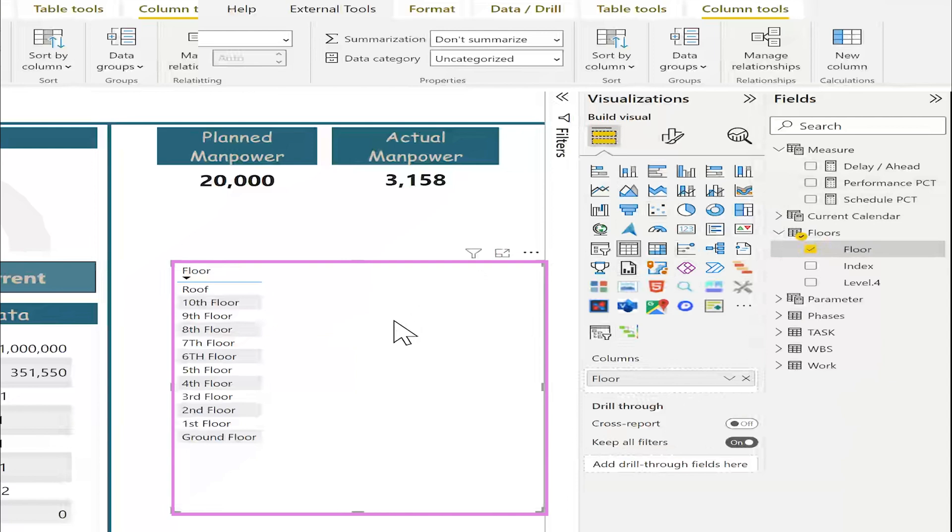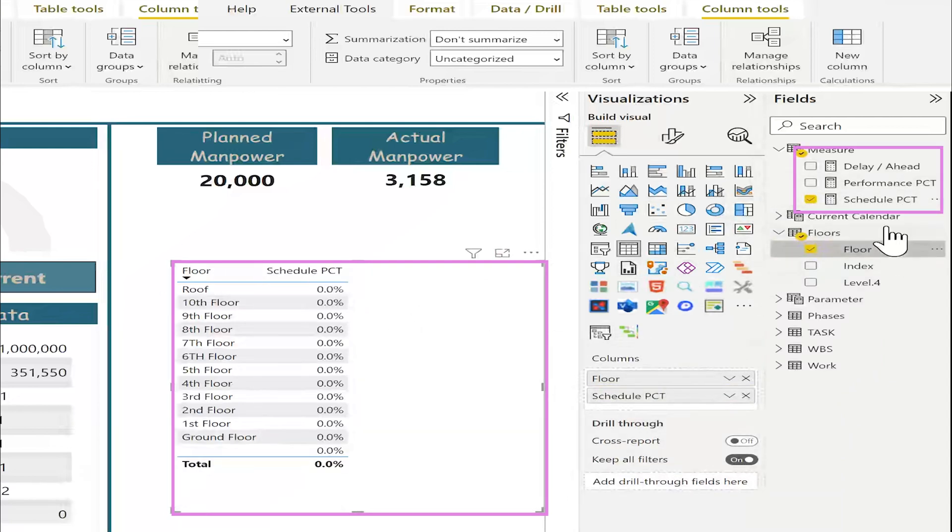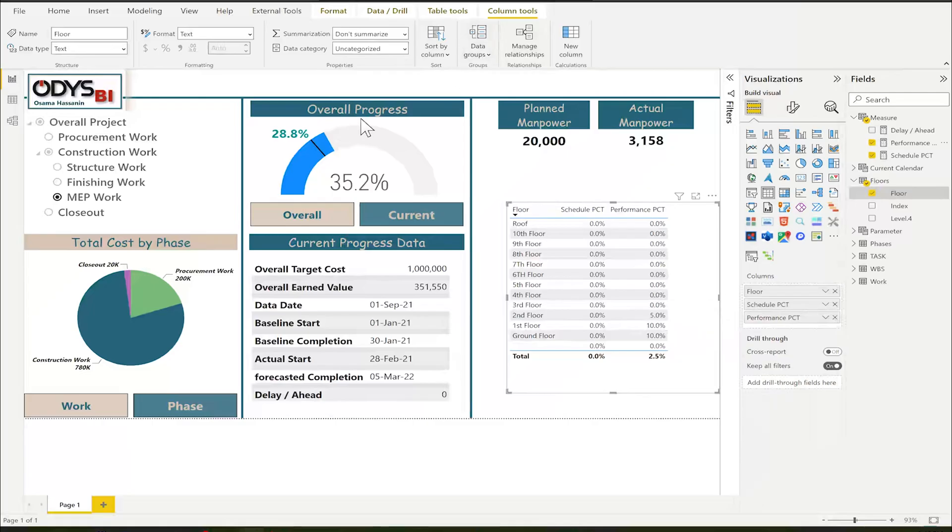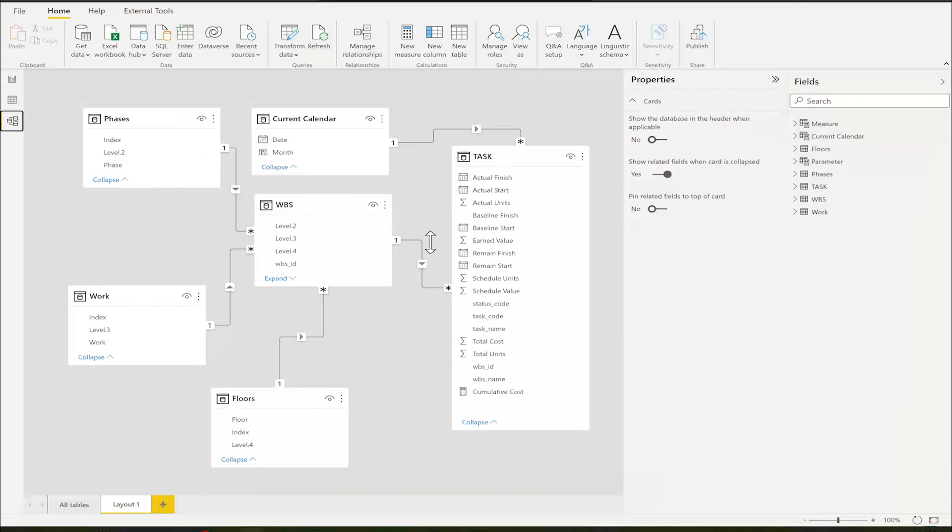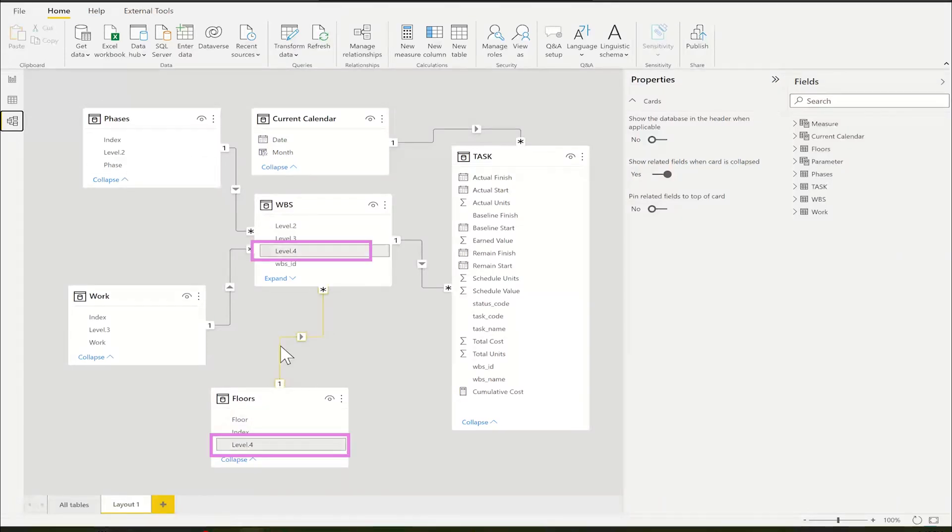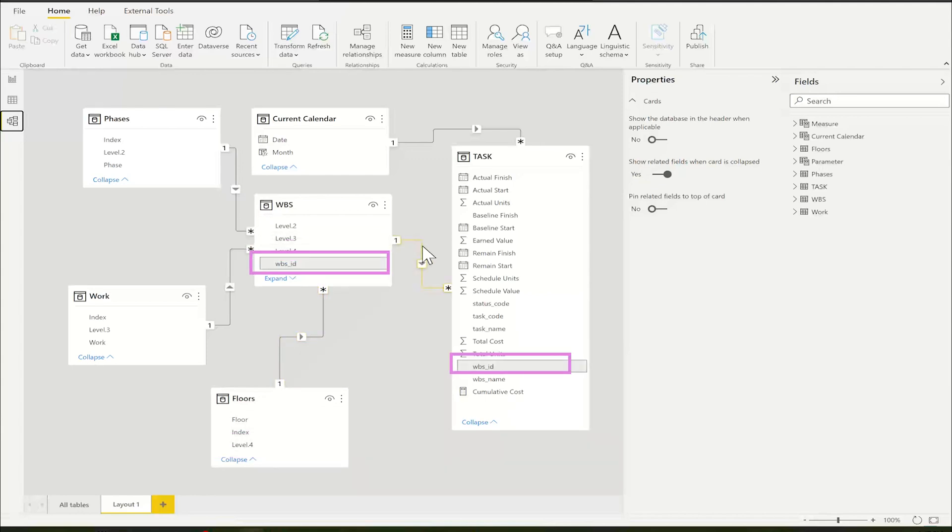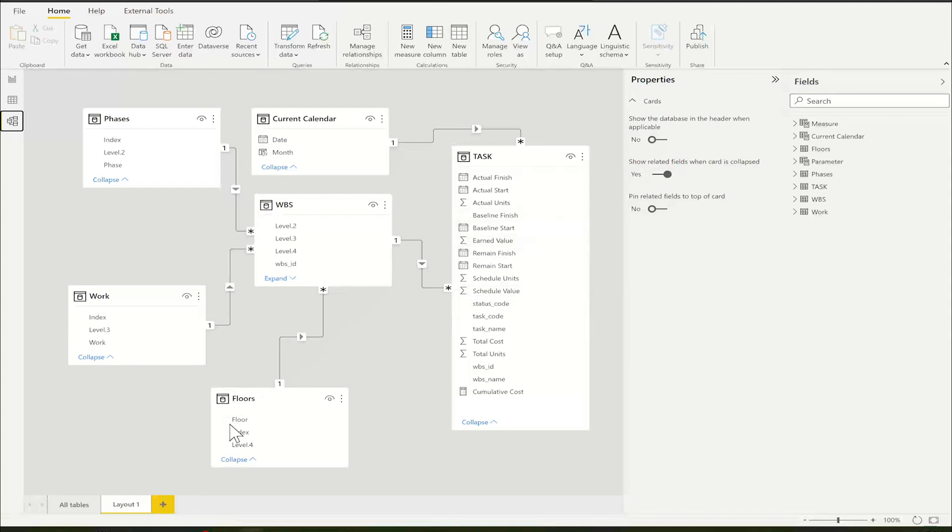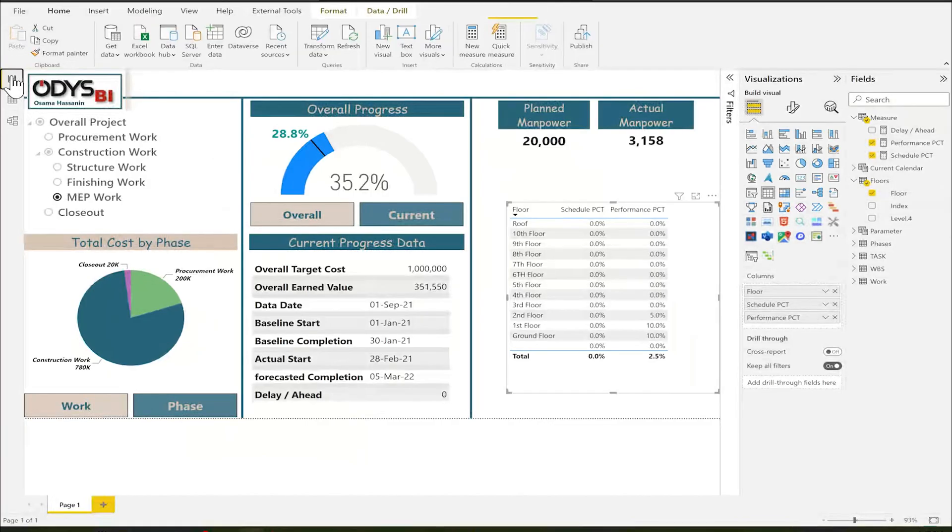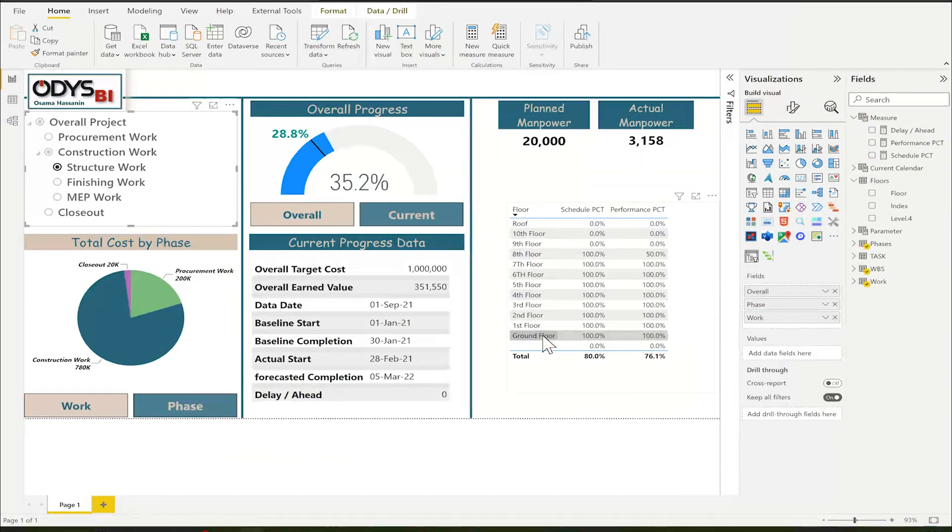I will add here two percentage: the schedule percentage. If you remember, because we have linked tables with the relation, if I am working in the floor, the floor is linked to WPS by level four, and the WPS is linked to task by WPS ID. Whatever value for schedule cost, total cost, earned value cost, it will be linked to the floors. If you see here, I have progress here for the ground, schedule percentage, and performance percentage.